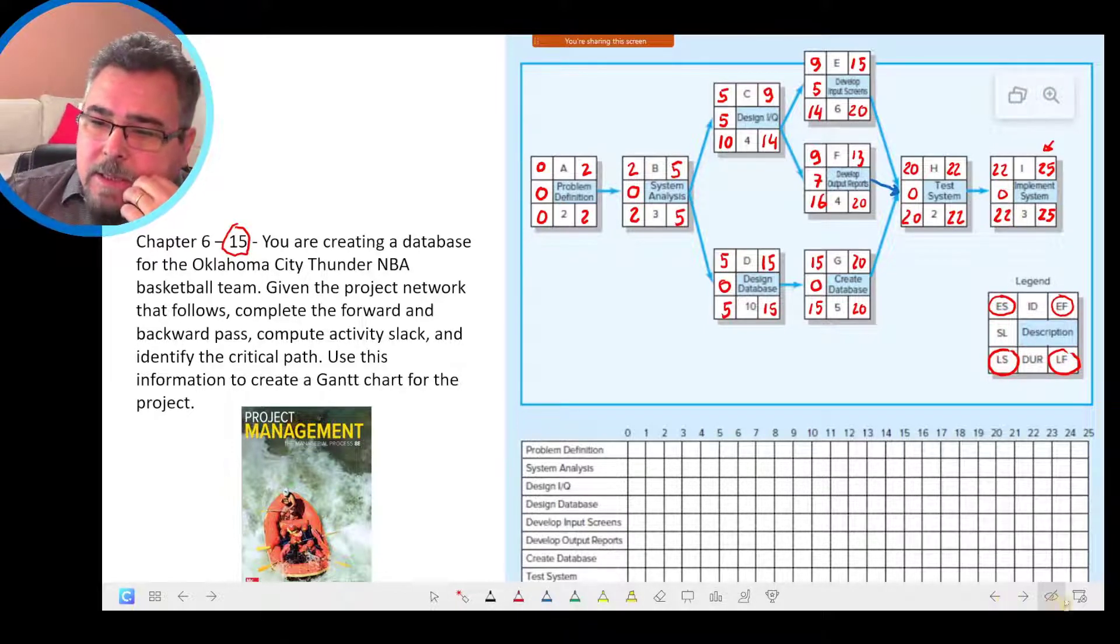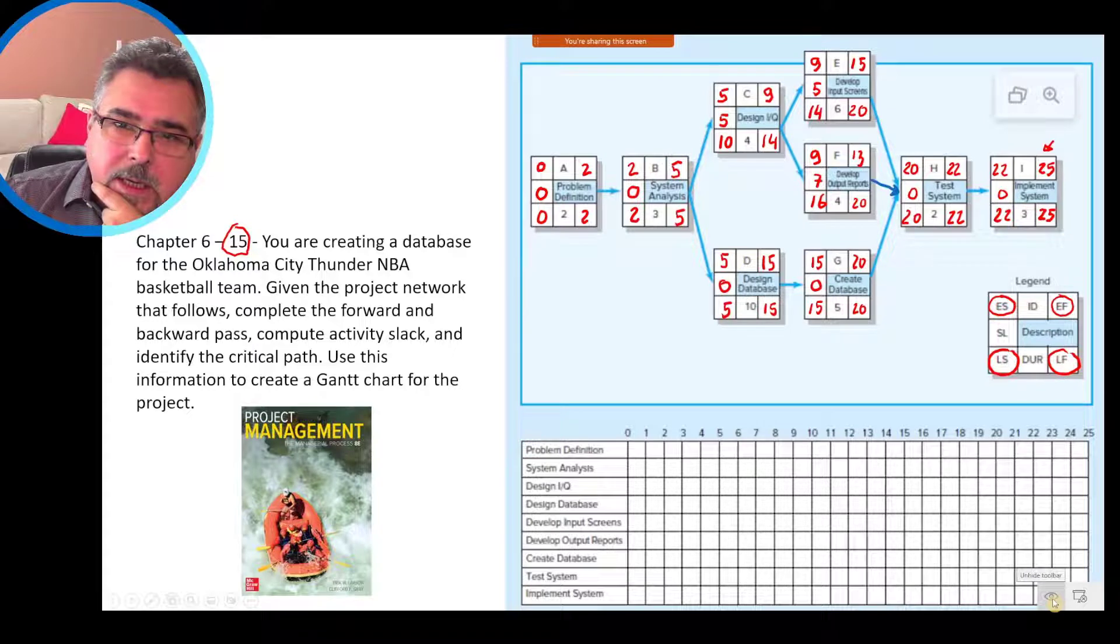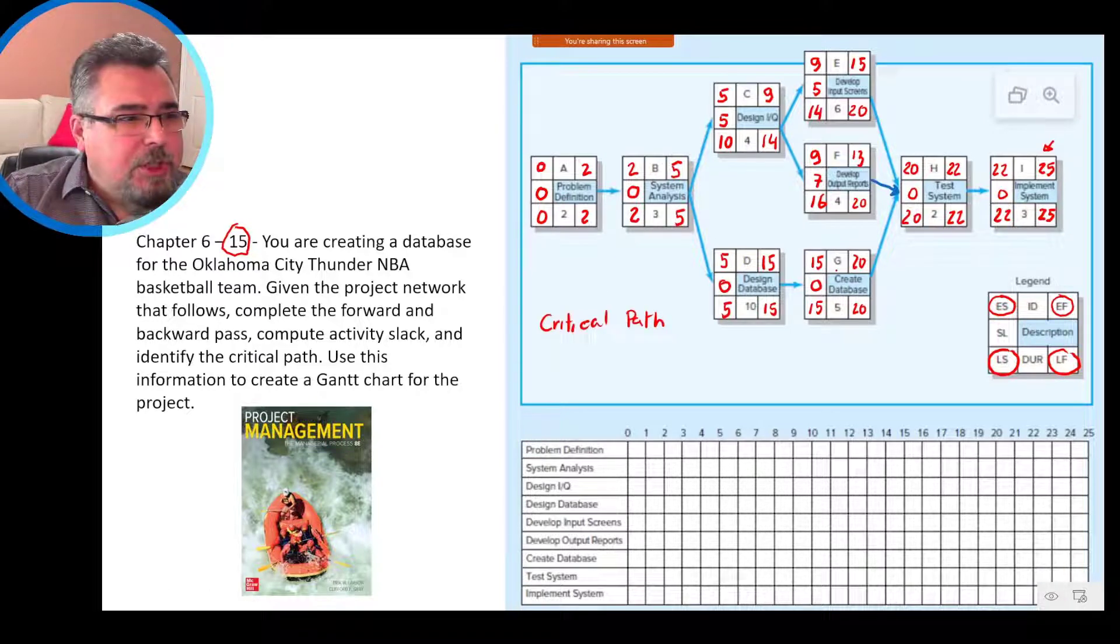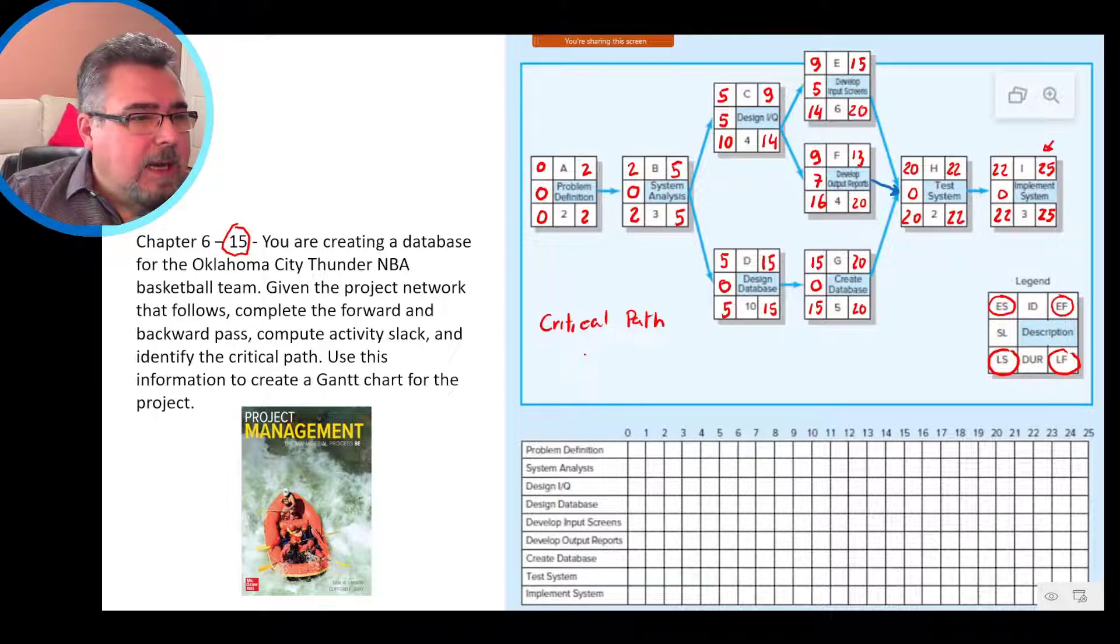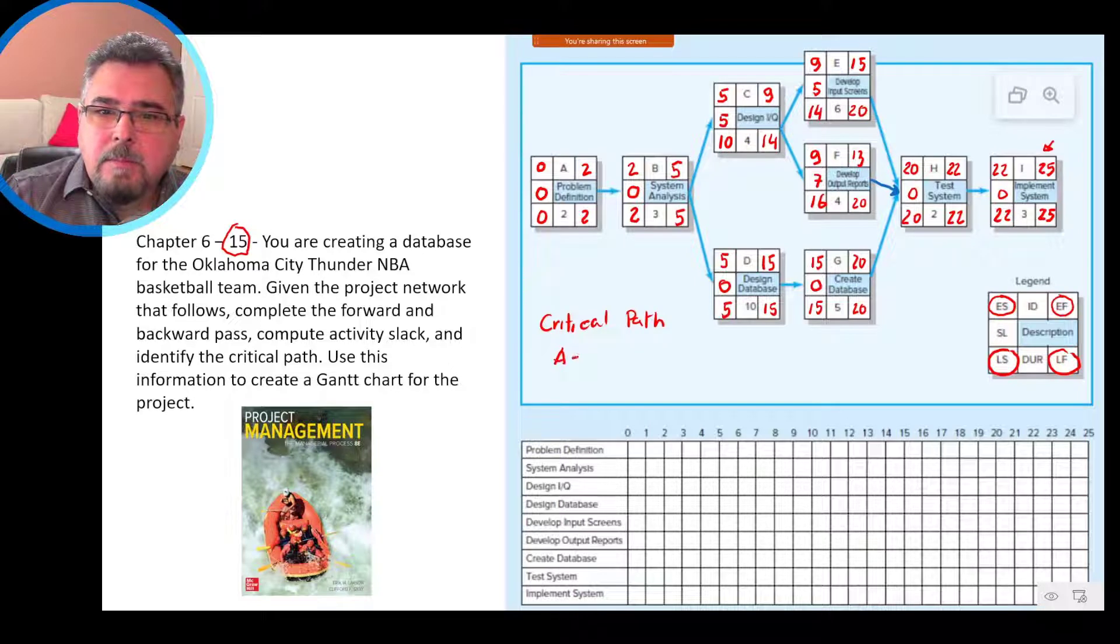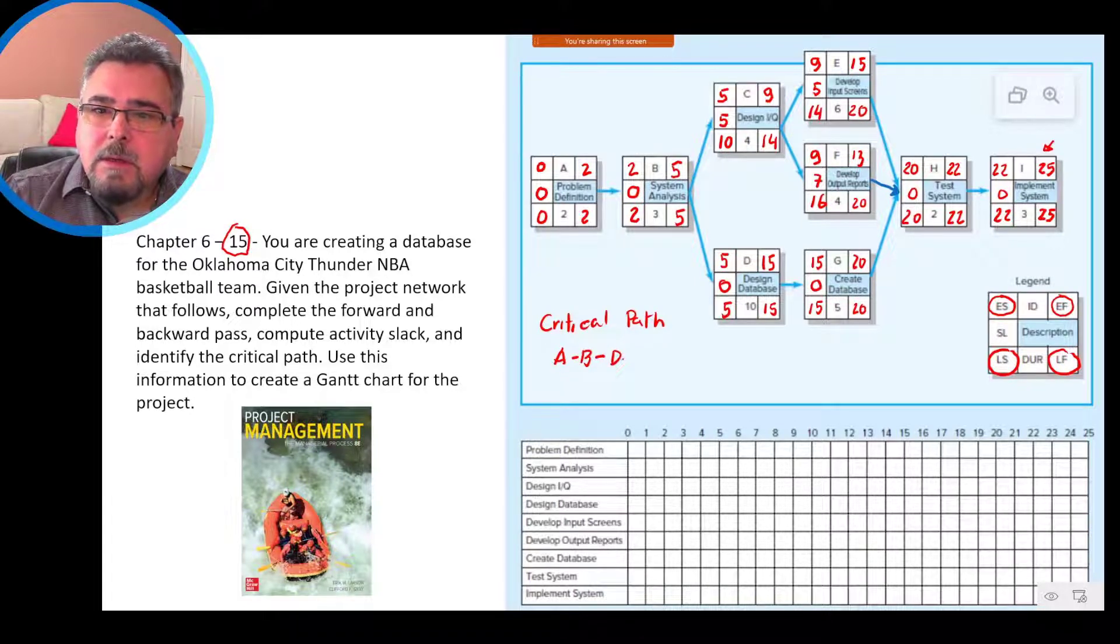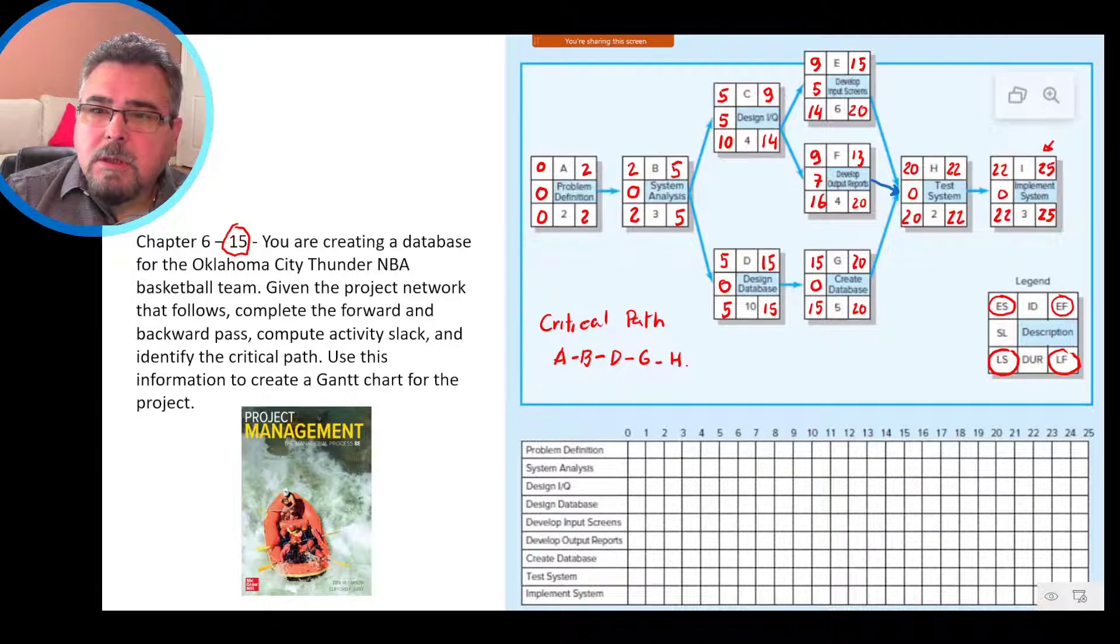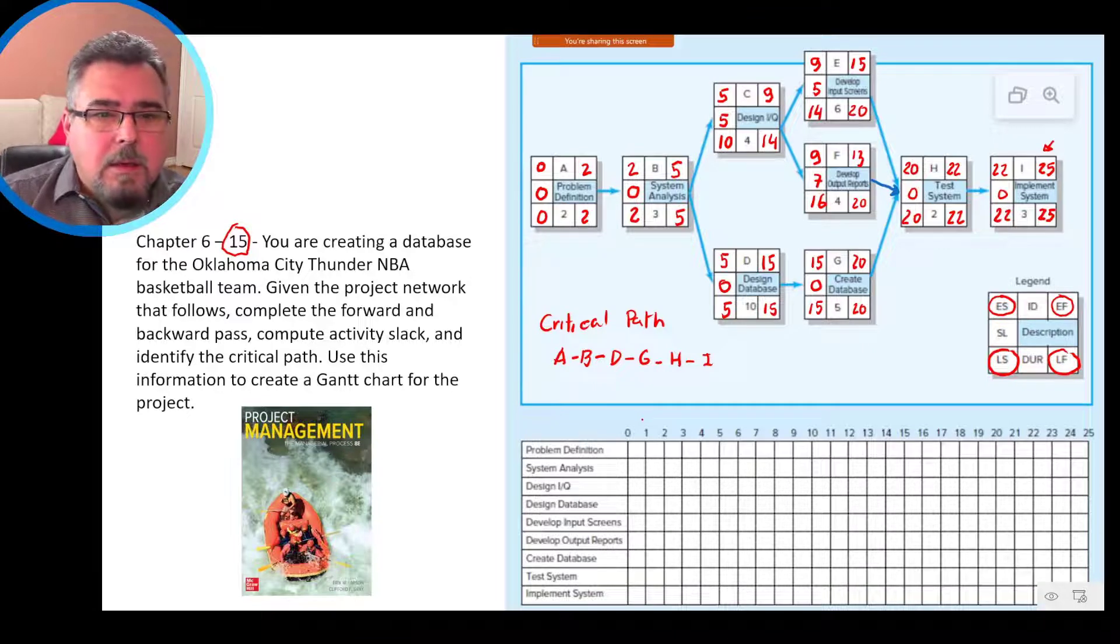What is the critical path? Who can tell me what is the critical path? It's A, B, D, G, H, I. Excellent, excellent. So it's A, B, D, G, H, I. That's the critical path.